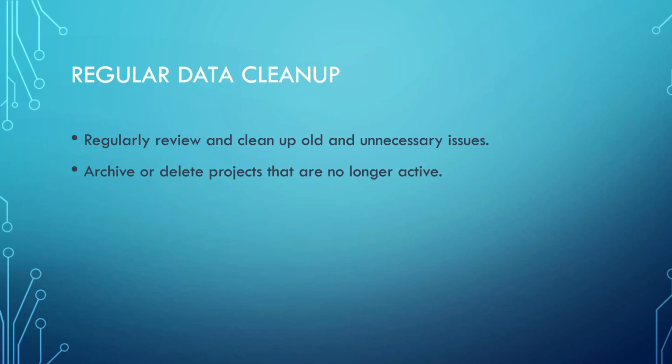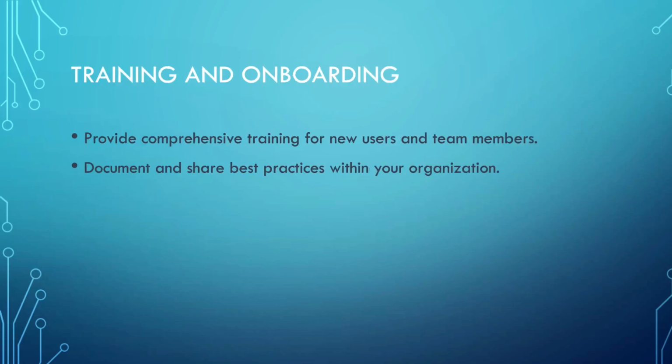Archive or delete projects that are no longer active. Correct. But usually it's gonna be archived. Why not deleting them? Because some people, and it happens, let's say after 3 or 4 months, they get a request and then they request to admins that they need some specific project because they need either to do an audit or to, I don't know, do some reports based on that because they were asked to.